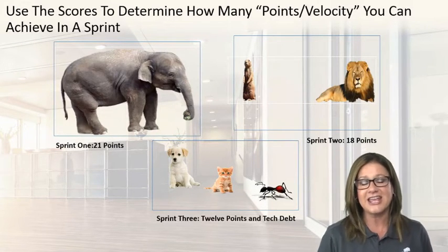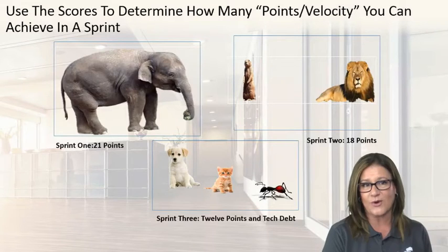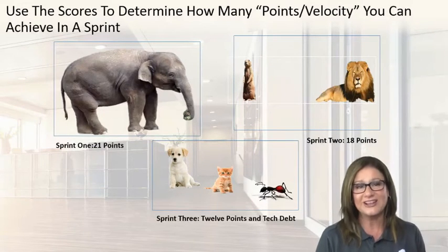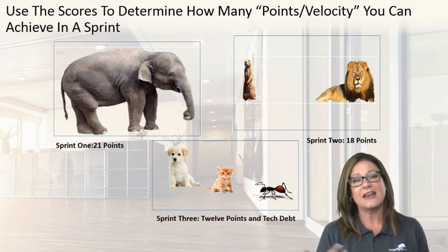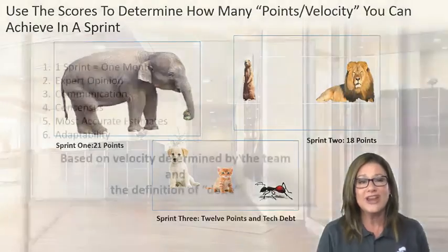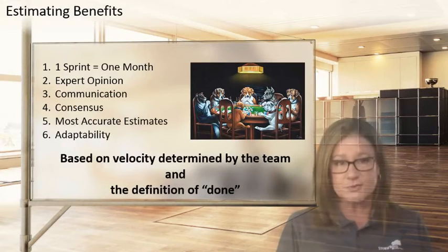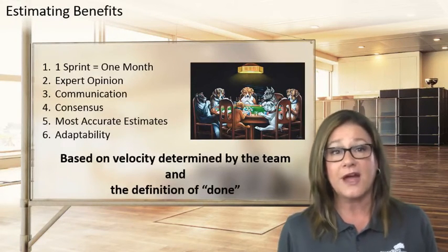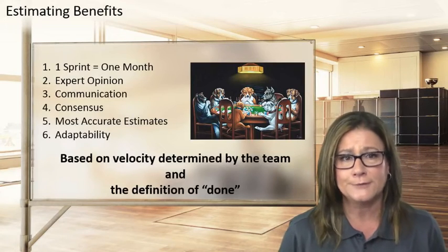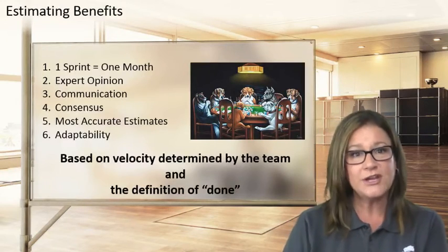This way of allocating or scoring our time, if a customer says, how long is it going to take for all of this to be accomplished? You can say 3 months. And you've got a duration that you can answer that question. But you also have something that's realistic as far as time is concerned and allows you and your team to dictate really and allocate the amount of work that you can actually accomplish in a sprint. One sprint typically equals 1 month. So we're trying to figure out how much work we can accomplish in 1 month without overworking. And we also want to make sure that we're producing something viable at the end of each sprint for the customer.